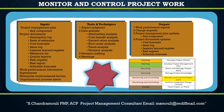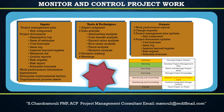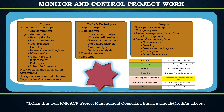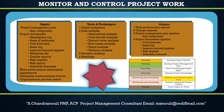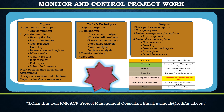The next input is Work Performance Information. Work performance information is the performance data collected from the controlling processes, analyzed in context and integrated based on relationships across areas. Work performance data has been transformed into work performance information. Data alone cannot be used in decision-making as it has only out-of-context meaning; work performance information is correlated and contextualized, providing a foundation for project decisions. It is circulated through communication processes. Examples include status of deliverables, implementation status for change requests, and forecasted estimates to complete.